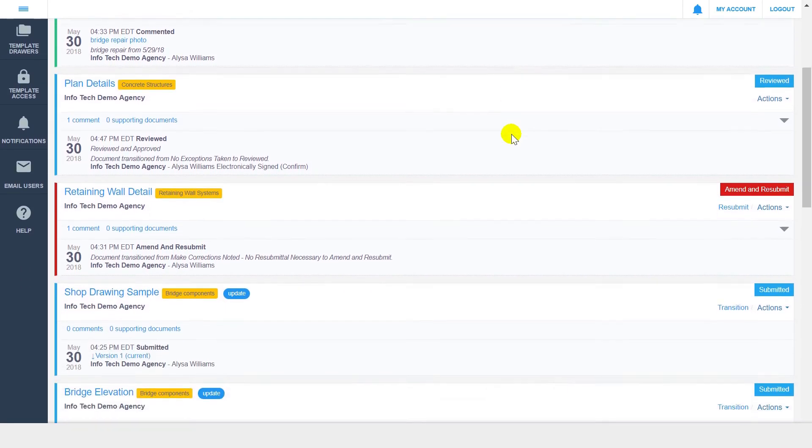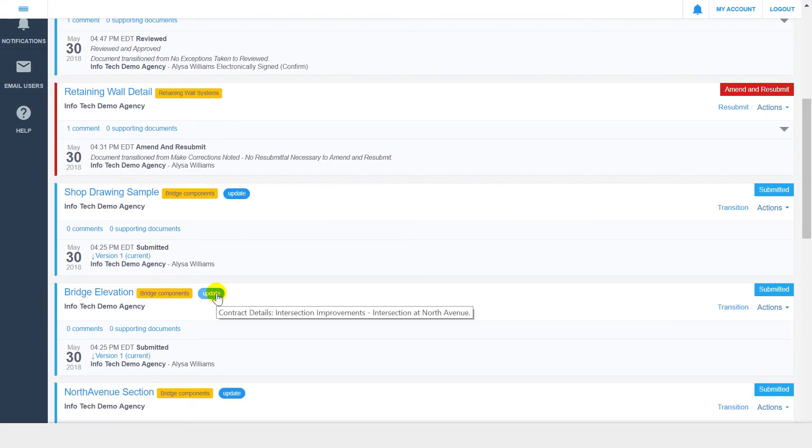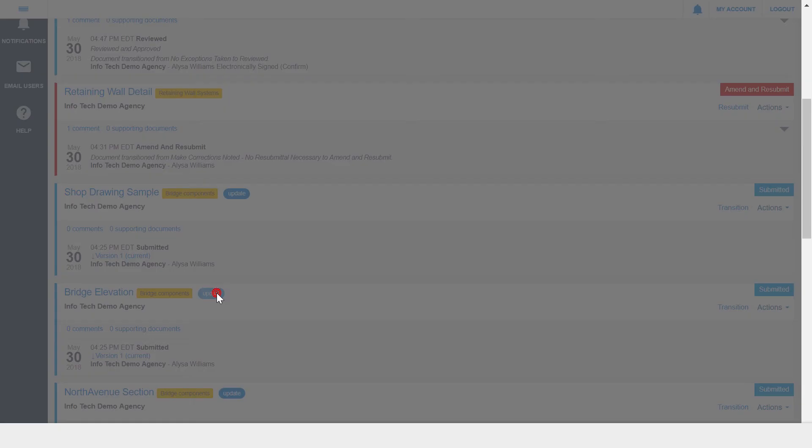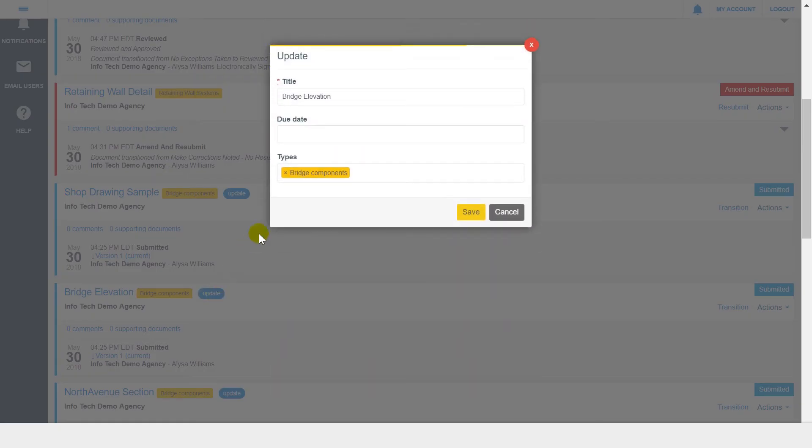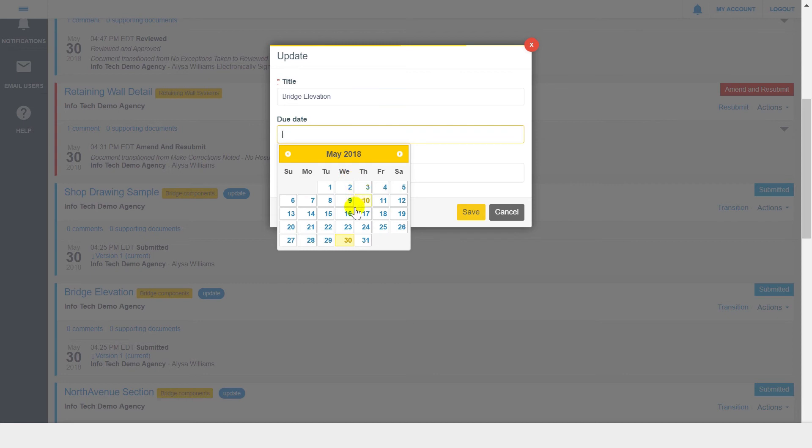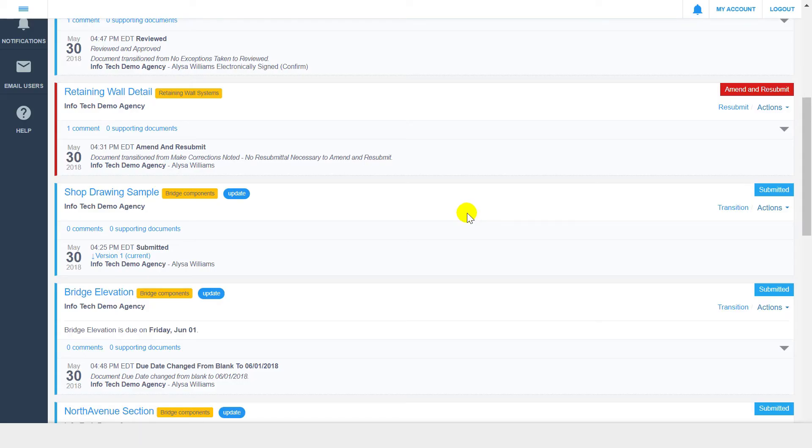Documents within DocExpress can also have due dates, which can be configured by clicking Update next to the document name. If a document is overdue, that will be reflected in the document's audit trail, and the Dashboard feature allows you to view all overdue documents across all your contracts.